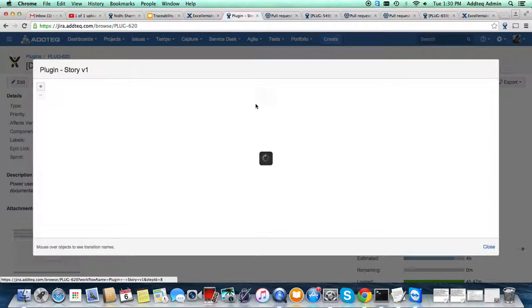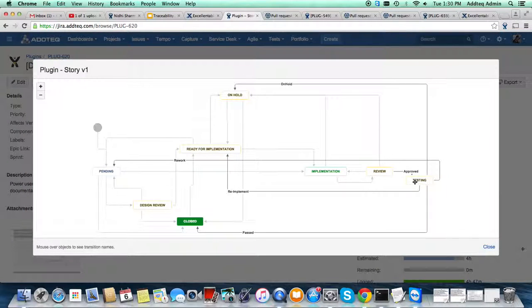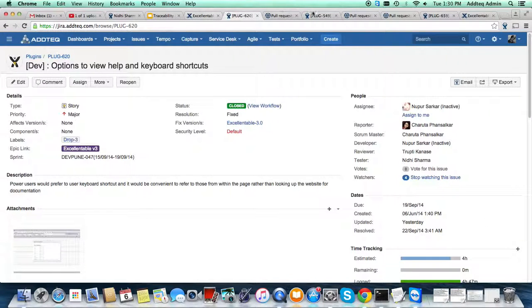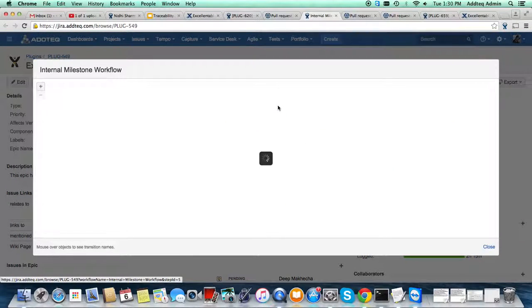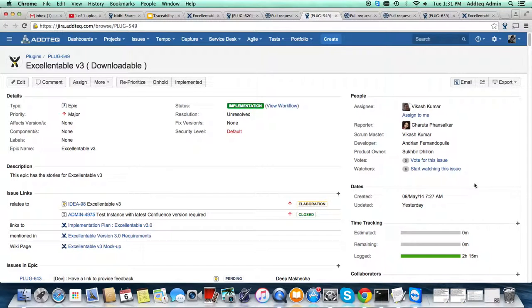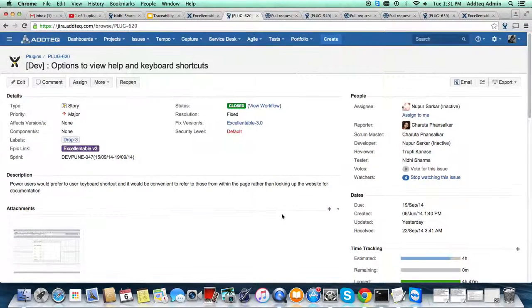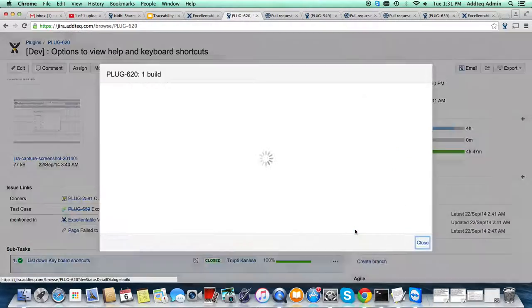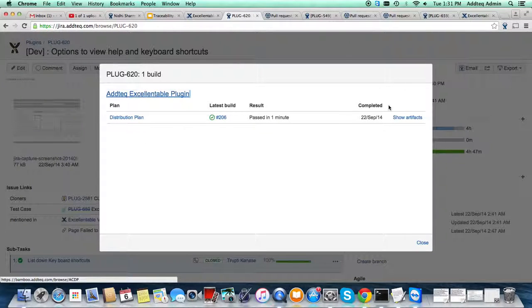Once the pull request is merged, it goes to testing. At the story level, we perform unit-level testing. Once we have completed one feature, it goes for staging implementation where integration testing is performed. Coming back to the story ticket, you can see the pull request is merged and a build has also been created. If you click on the build, you will get details from Bamboo.